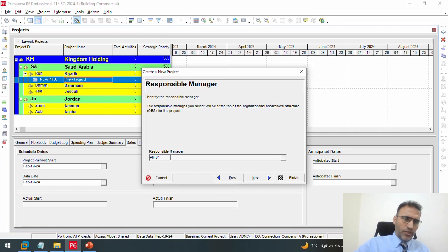Who is the responsible manager? By default, as you can see from before regarding the EPS and the OBS, we have assigned PM01, project manager 01, or we could call him Ahmed, Khalid, whatever. We will assign him as project manager for all the projects in Riyadh. So any project created in the Riyadh region will have PM01 as the responsible manager. But of course, we can change it.